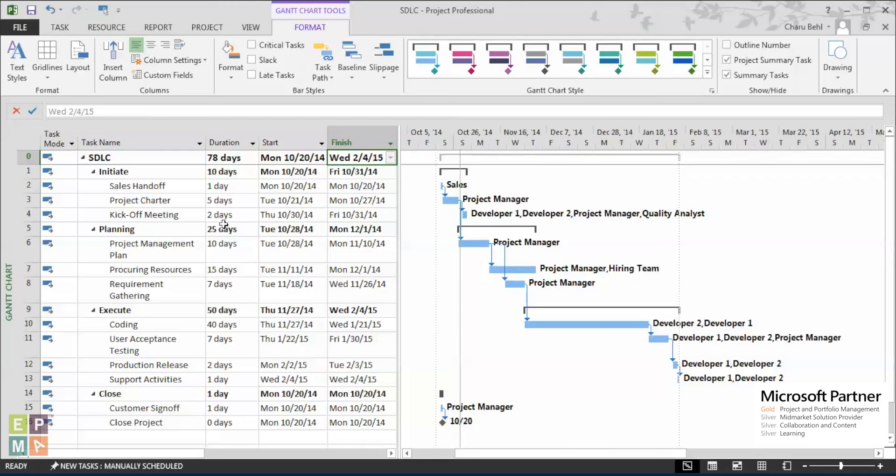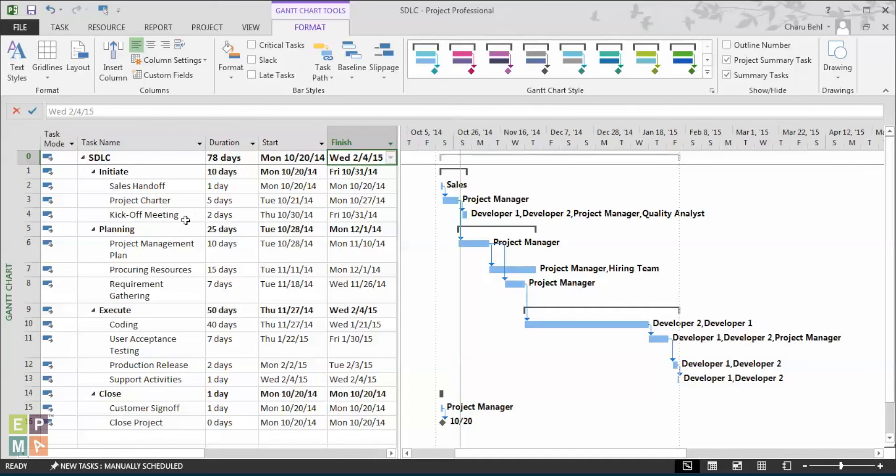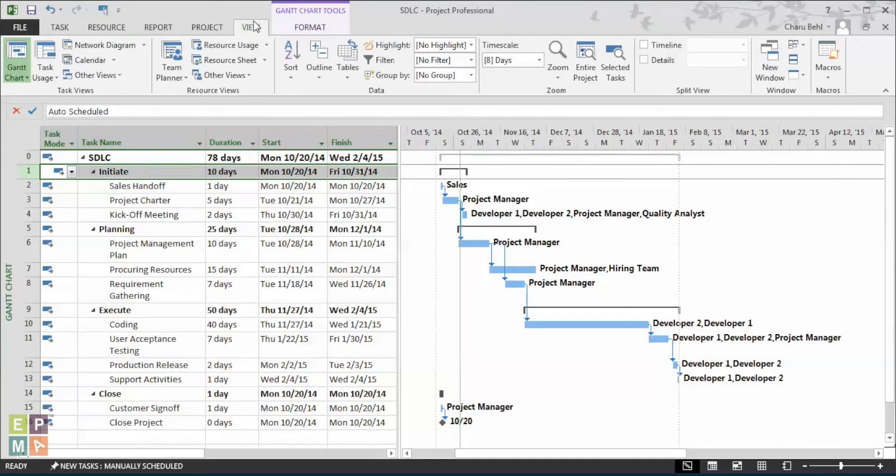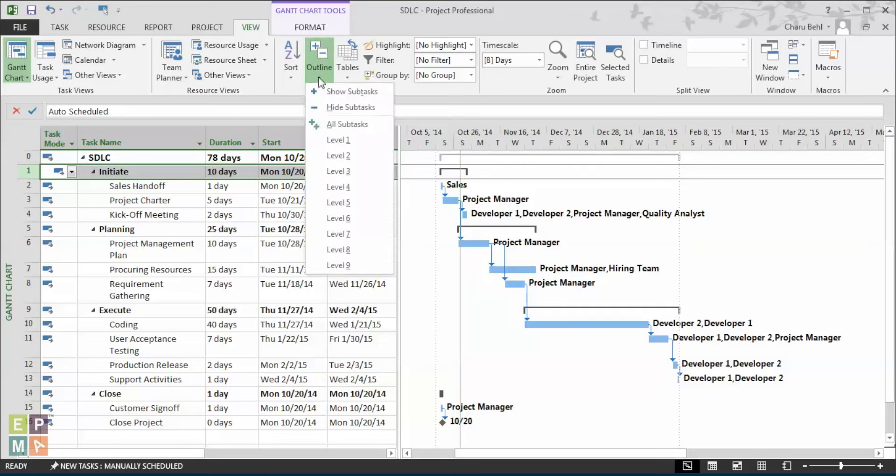Sometimes when you're showing your schedule to upper management or some of the major stakeholders, they might be just interested in the high-level information. So to view all the phase information, you can simply go under the view ribbon and from the outline drop-down, you can select level 1.